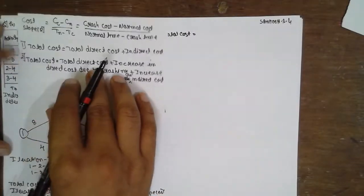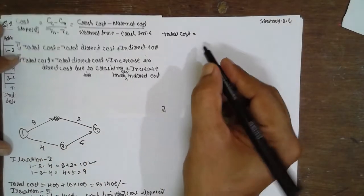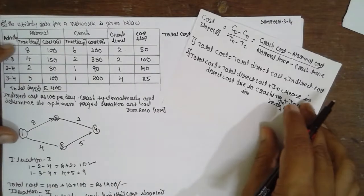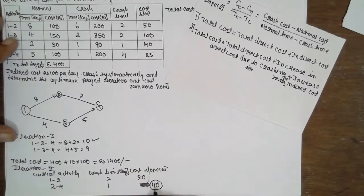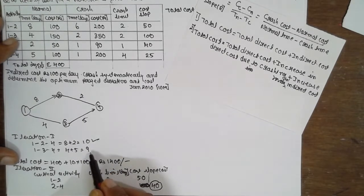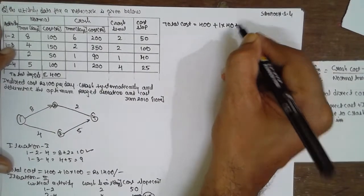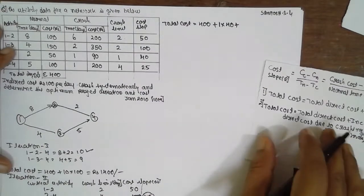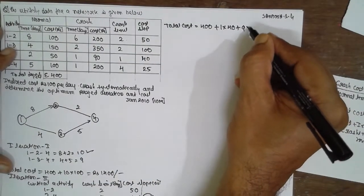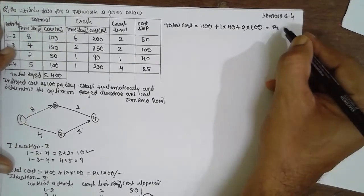The formula for total cost is: total direct cost plus increase in direct cost due to crushing plus indirect cost. Direct cost is 400. We can crush by 1 only, because 10 minus 9 is 1. So: 400 plus 1 into 40, plus 9 into 100. The answer is rupees 1340.